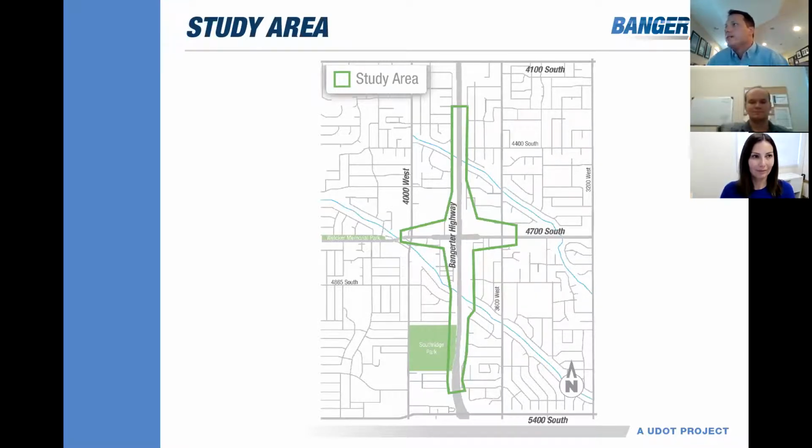Just to ask kind of a follow-up with that, maybe Tyler, you can jump in on this one. How did we determine for an environmental document the study area limits? That's from Michael Spott. We look at these interchanges to find logical areas where the impacts may occur. So where the construction may extend to, where noise impacts are likely, and we border the study area by that.